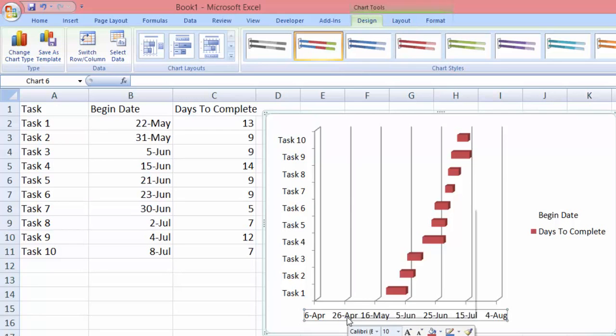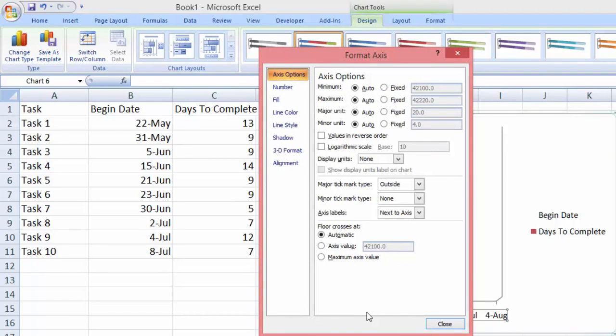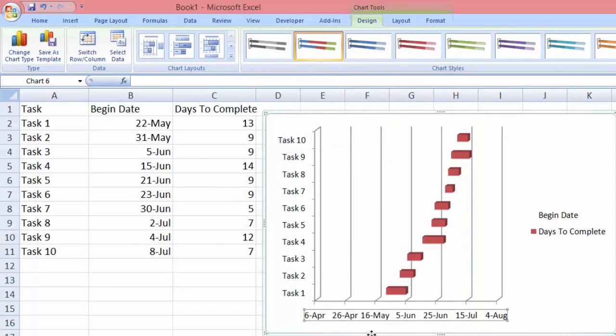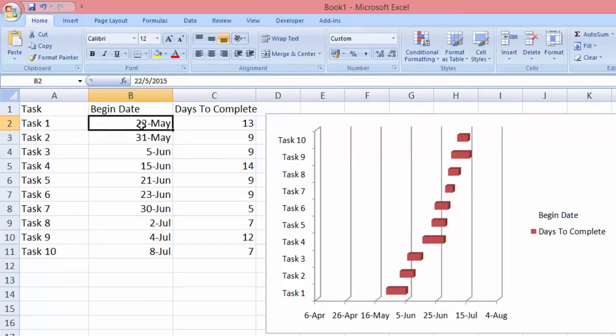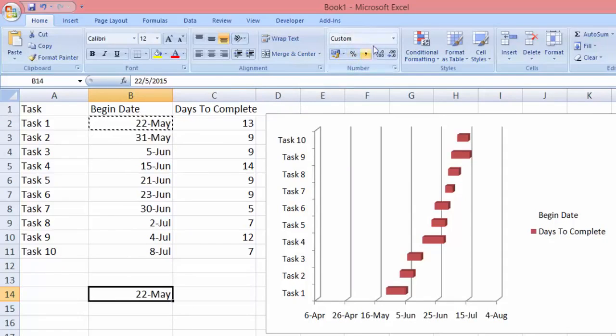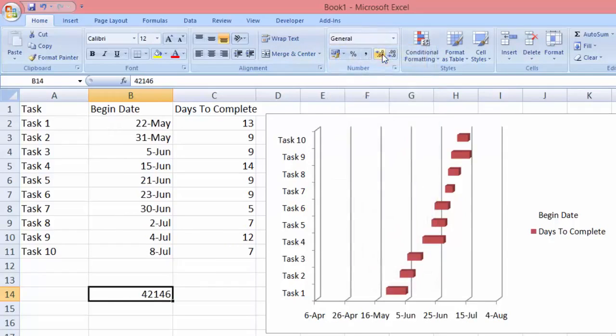It's the same thing - you have to right-click, format axis. In this moment you will see this area over here, the axis option, and you will see a bunch of numbers. Let me tell you what it is. Our start date, the earliest start date for us, is the 22nd of May, it's right down here. The next step you need to do is to copy this and just paste it anywhere empty. Then you select this cell, go to this area over here and click general. Once you click general you can see that this is the number 42146 - this represents the date 22nd May here in Excel.